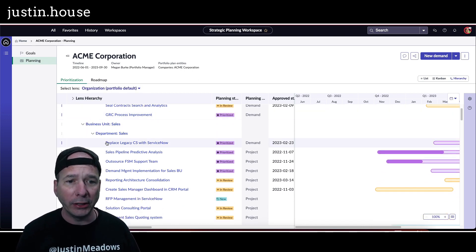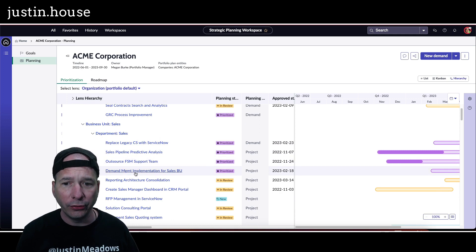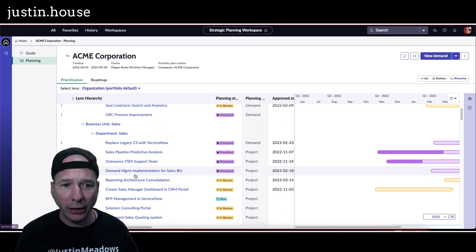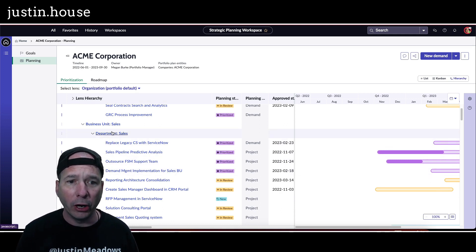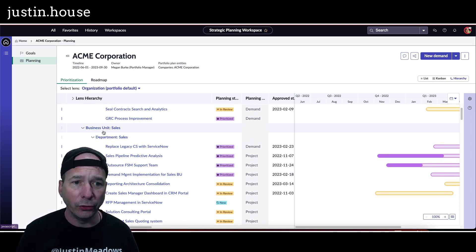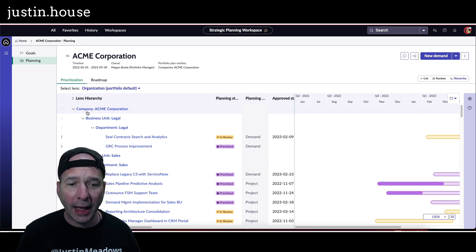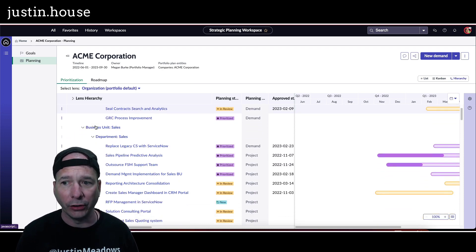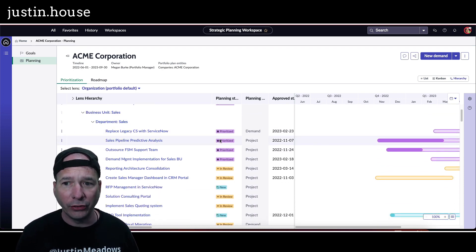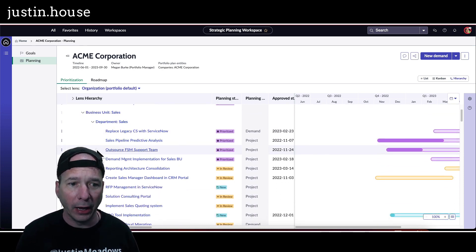And by hierarchy, what they mean is it's breaking down: 'Okay, here's the demands and projects that are part of department sales that are part of the business unit sales that roll up to the company ACME Corporation.' So that's a new way to see that priority.